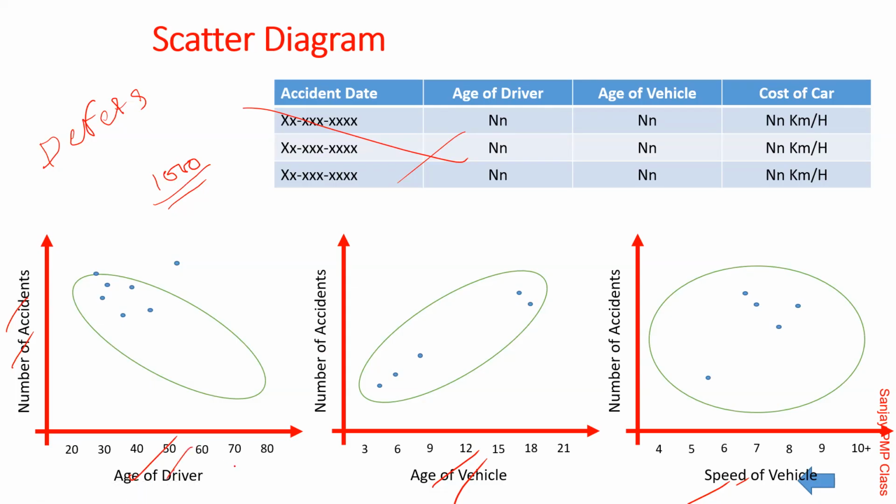One, let's say, is the experience of the developer. Then the experience of the tester, how they are testing, because you are doing internal testing and sending it to the customer, and still customer complaints are coming. And in the third one, you say requirement capture time. Why? Because if you do requirement capture at a detail level, the defects could reduce. It is obviously possible. You never know whether it is so. So that's how you put the number of defects. For example, developers having 2 years of experience, so many defects happened. With 3 years of experience, so many defects came, and so on. Similarly, for that particular release, the testers' experience and so on.